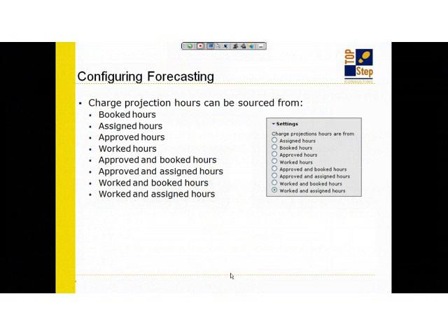The first part of the form talks about what your method is. How do you forecast? Where do you get your future hours from? Hopefully a lot of these hours values sound familiar, but for many of you, booked hours may not sound familiar. You may have called them allocations, staffing, or resourcing. Anything that uses the resources module to allocate or assign people to projects without having to be inside the project. As you can see from the options, it handles all the different ways time can be captured or forecasted in the system.